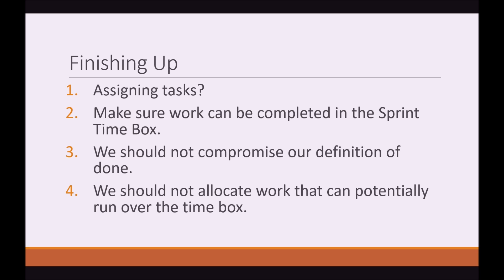We must make sure all the work can be completed within the Sprint time box. We should not compromise our definition of done, and we should not allocate work that could potentially run over the time box. This is to put as little stress on the development team as possible, so they can take their time to research, review the existing code, and make sure the new features they're building are done to the best of their ability — not rushed, no shortcuts taken. In Agile, how we approach every task is to look for the quick win first and then refactor the code, so we need to make sure there is some time for refactoring to ensure whatever we build is at a good standard.